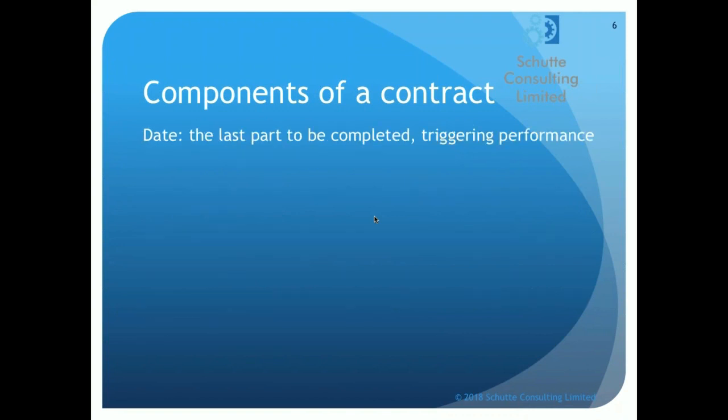Right, so the date is the last bit to be completed. Okay, it usually triggers performance by the parties. So you'll often see that written in pencil saying do not date or something like that. So don't touch that bit until all the rest of the contract has been completed.